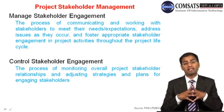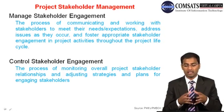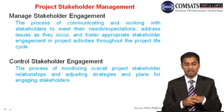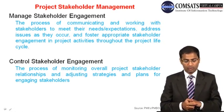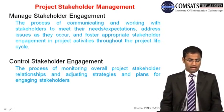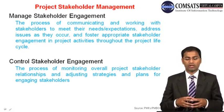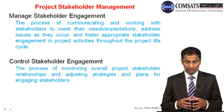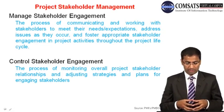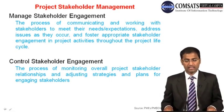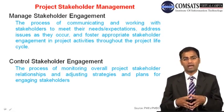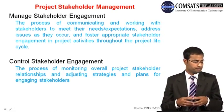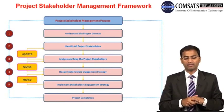Manage stakeholder engagement is the process of communicating and working with stakeholders to meet their needs and expectations, address issues as they occur, and foster appropriate stakeholder engagement in project activities throughout the project lifecycle. And lastly, control stakeholder engagement is the process of monitoring overall project stakeholder relationships and adjusting strategies and plans for engaging stakeholders. These are the four processes of project stakeholder management as per PMI PMBOK.